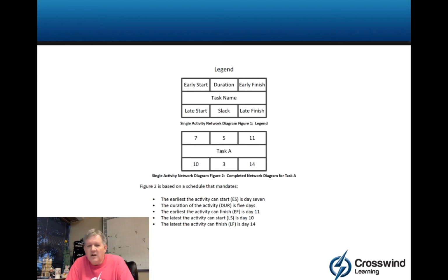So if you look on the right side, you have 11 and you have 14. So 11 from 14 gives me a difference of 3. Okay, 7 from 10 on the left gets me a difference of 3. Thus, that should always be the same difference. The numbers that make the calculation might be different, but the subtraction should always give me the same number. So if I get 3 by subtracting my right corners, I should get 3 by subtracting my left corners.